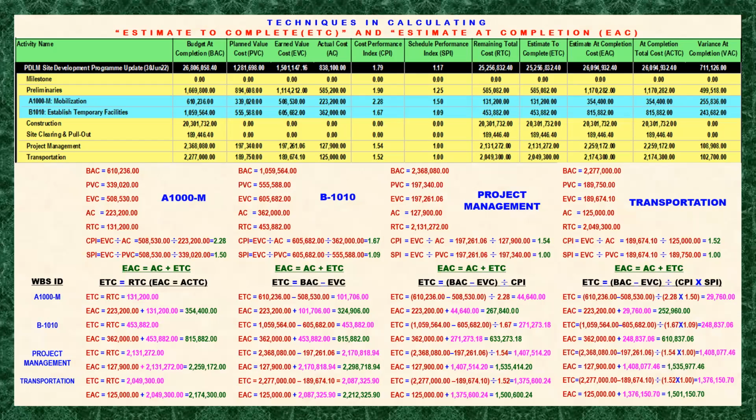Second, the budget at completion and the earned value variance, and influenced by the current performance of the project, schedule, and or cost performance, which means that the projection is being influenced by the current performance of the project. So, it could only provide us an approximate idea of how the current performance will look in the next period or future. Okay?